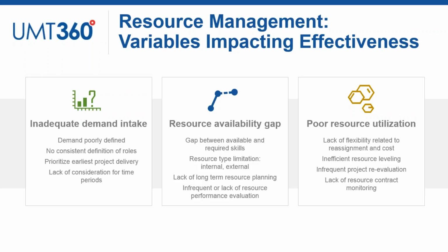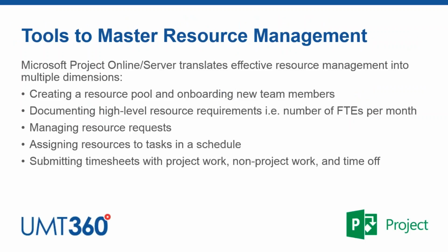in some organizations. And of course, resource leveling, which first of all requires having a good understanding of your demand and supply and having the ability to start moving projects around, trying to make sure people are not over-allocated all at the same time, for example. Okay, so these, in a few words, are basically the most common challenges we see when we talk about the objective of resource management. But now, what do we do in Microsoft Project?